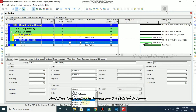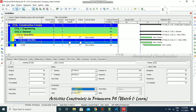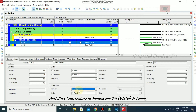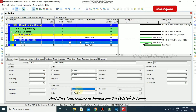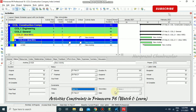We will consider first the start on constraint. When you are putting a start on constraint, the activity won't start before this date. It's a kind of restriction placed on the activity — it won't start before the date mentioned. It prevents early start and also accelerates late start based on the imposed date. For start on constraint, we can only put a primary constraint, not a secondary constraint.